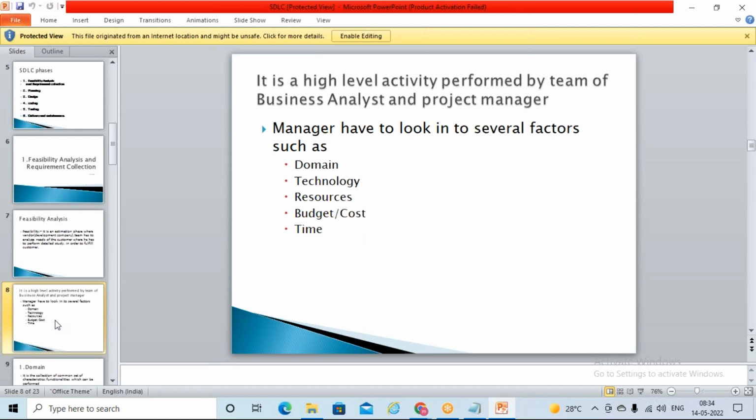The other part is fixed pay. Fixed pay is a total amount, one-time settlement. Like, I'll pay 10 crores, and I want this project done in 1 year. You put 10 resources or 5 or 15 or 20, I don't mind. You complete that project. These things will be in the agreement, discussed first only. The statement of work and non-disclosure documents will all be there. You first sign it, and once it is done, you start working on the project.